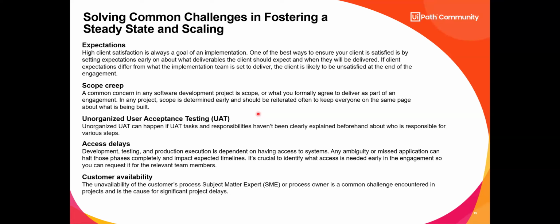We're controlling scope creep. Then we control scope again on deployment when we turn it over to the support staff, because then that change control process changes. And it goes down into that backlog where we're putting that. That's how we control scope creep. We don't want them to have a different expectation of what we promised to build and didn't build.